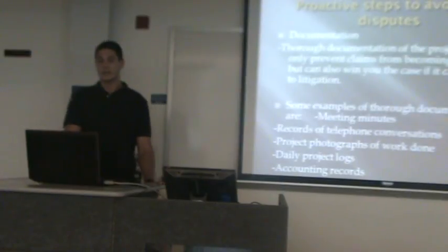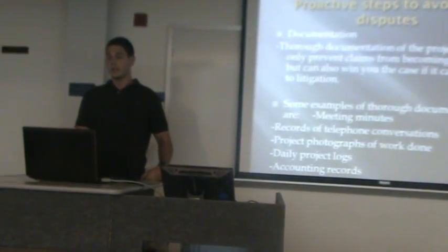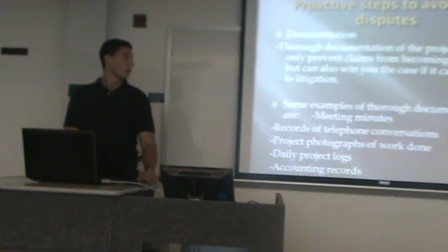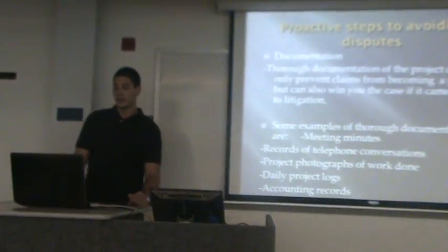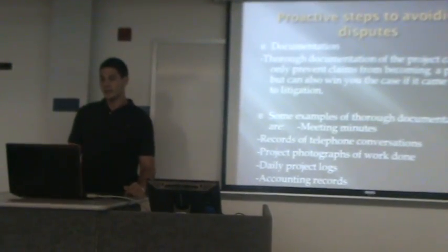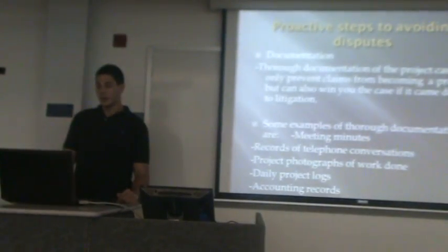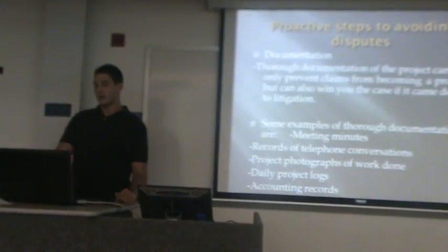Another way to be proactive is documentation. Thorough documentation of the project can not only prevent claims from becoming a problem, but can also win you the case if it came down to litigation. Some examples of thorough documentation are meeting minutes, records of telephone conversations, project photographs of work done, daily project logs, and accounting records.